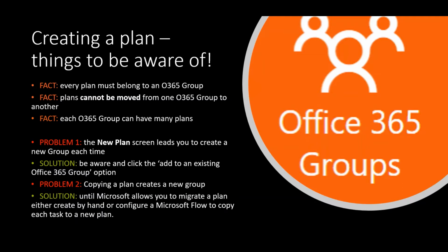The first thing is that every plan must belong to an Office 365 group. The second is that plans cannot be moved from one Office 365 group to another. So if you created a plan in the wrong place, you can't move it. And each Office 365 group can have many plans. So you can start from your group and you can add new plans into it.